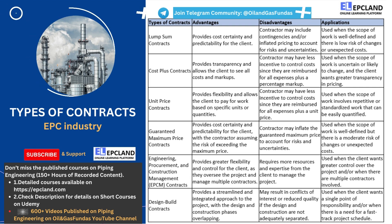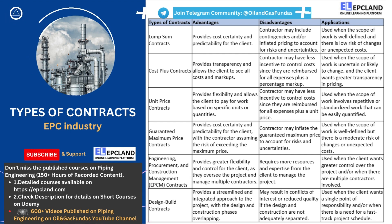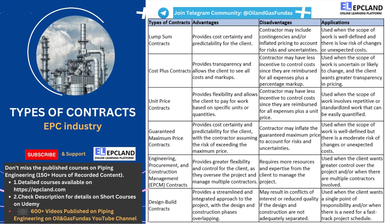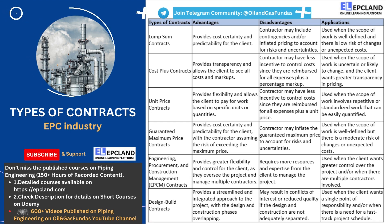However, there are also some potential disadvantages to EPCM contracts. Because the client manages the project themselves, it requires more resources and expertise to effectively manage the project. This can be challenging for clients who are not experienced in project management or who do not have sufficient resources to manage the project effectively. Overall, EPCM contracts are best suited for clients who want greater control over the project and who have the resources and expertise to manage the project effectively. They can provide flexibility and potentially save money by avoiding markups charged by a general contractor. However, they require more resources and expertise from the client. As with any type of contract, it is important to carefully consider the specific terms and conditions of an EPCM contract before entering into it.